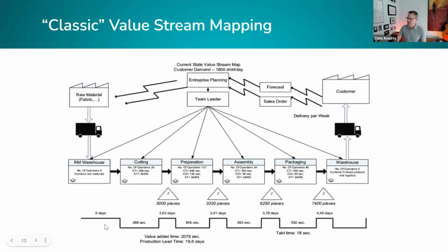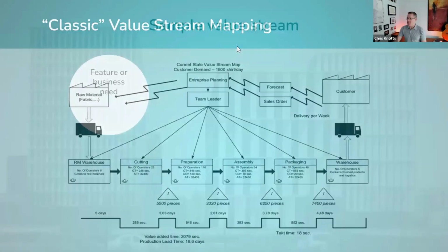You can see you're measuring the days, you're measuring the cycle time, you're mapping the processes, you're measuring the output. And this is a way basically of just stringing together all the steps in a process that produce value. Some steps produce value, some steps don't, as we see in a moment. And so what you want to do is optimize capacity so that as much of it as possible is focused on doing that work that falls into a process step that produces value. And that's what value stream mapping is all about. So this is classic value stream mapping as applied to manufacturing.